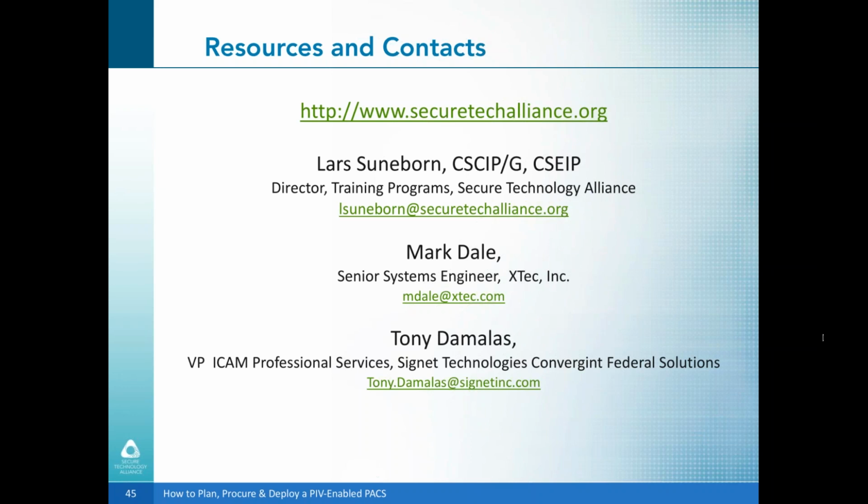There are two answers to that. One is driven by the approved product list and the process by which organizations are to acquire FICAM PACS systems. In that context, there are three major components that make up a solution: the PACS infrastructure, the validation system, and the PIV reader. The team that submits it to the approved product list includes a specific reader, and substituting a reader that is not on that same list or a group of listings with the other two package components, the validation and the PACS infrastructure, is not going to be necessarily a listed solution.